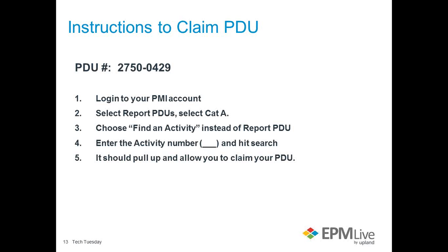Okay, so there was a question here about entering actuals at the enterprise level. So you can do tracking of your, whether it's your budget or your actuals, at any level that you prefer. So for example, we're doing our cost planning at the project level, but if you would prefer in your organization, you can do cost planning on, say, a portfolio level, whether you're entering a portfolio budget or the actual spend at the portfolio level.